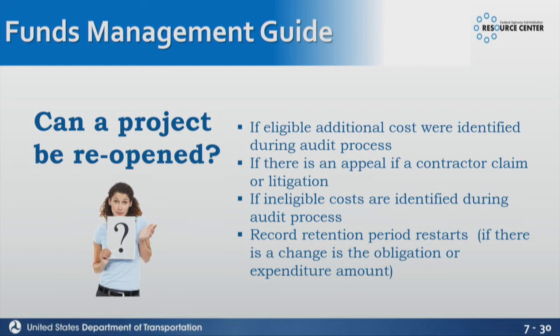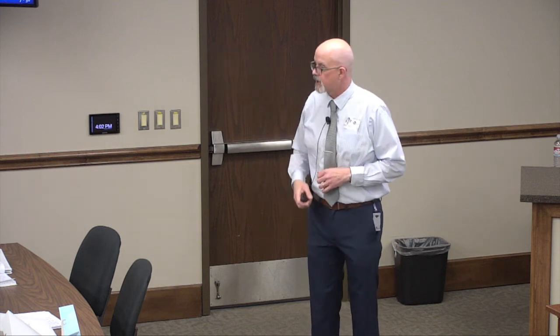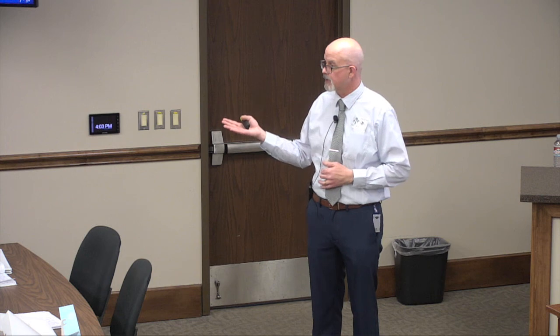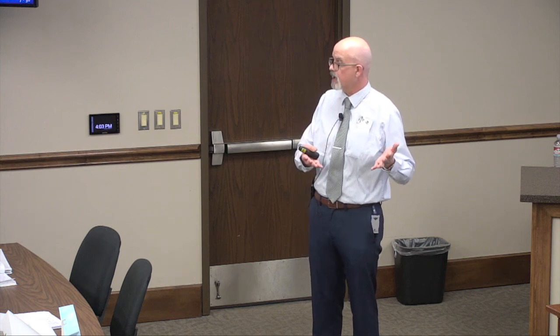warranty for plant establishment. Sometimes we'll see projects stay open for a long period of time because of this plant establishment period. Let's say the contractor has a year or a year and a half to ensure that whatever was planted survives. If it doesn't, then it's the contractor's responsibility to go back and remedy whatever the issue is, right? But they're doing it at their own cost. So there's really not a cost associated with that plant establishment period.